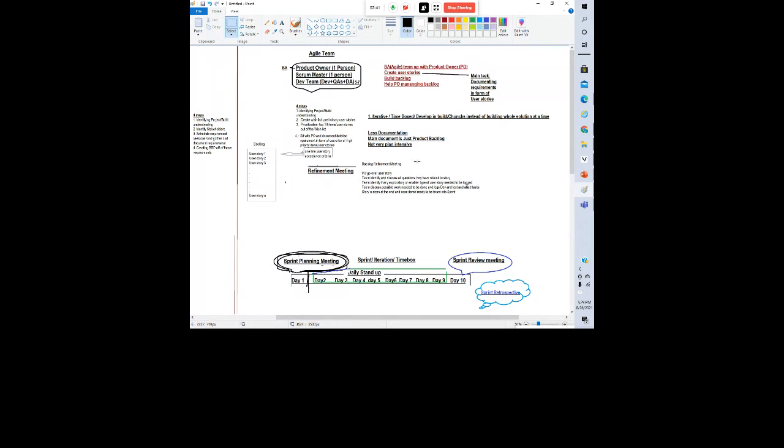logs that. And you as a BA, you are just sitting in the background, and seeing if there is any story that's needed to be logged. So you act as a scribe, means like just take notes related to if any new story needed to be logged. You just take note that this story needs to be logged, and then log that user story in the backlog. Okay, and team also discuss what they need to do, what tasks they need to do, and all that in that meeting.